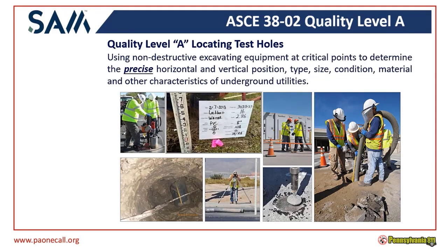This is great for, like I said, with electric ducts, telephone ducts, that sort of thing. Let's confirm, hey, how big is this? How deep is it? All that kind of stuff. This utilizes a technology, vacuum excavation, to give you that kind of information so you have it for your design. Or, hey, you need that for your construction as well. So this gives you that information.